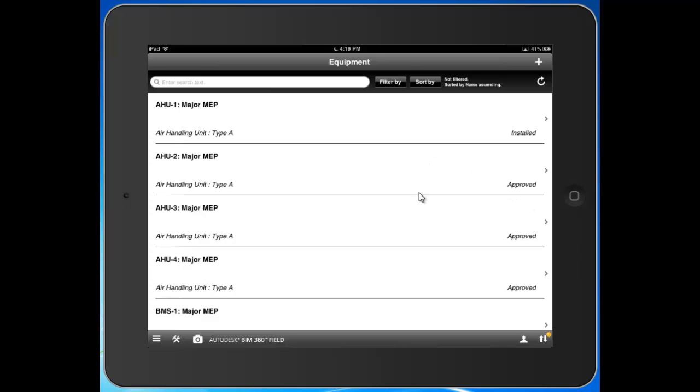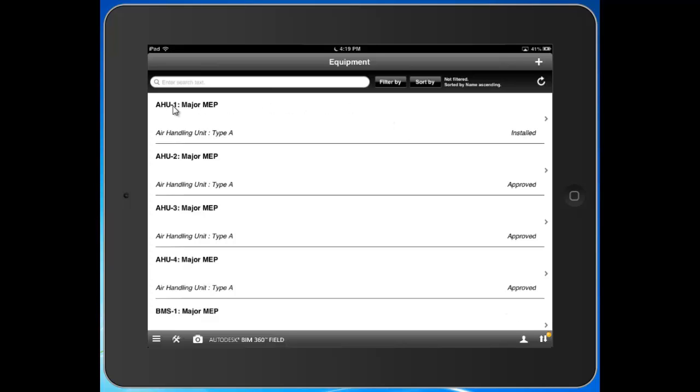So you can see here my equipment list on my project. You can see the components, their categorization. I can report out on the statuses of all the categories here. The statuses here to my right are completely configurable. These are ones that I set up that I use on my sample project to track the installation and handover for these components.